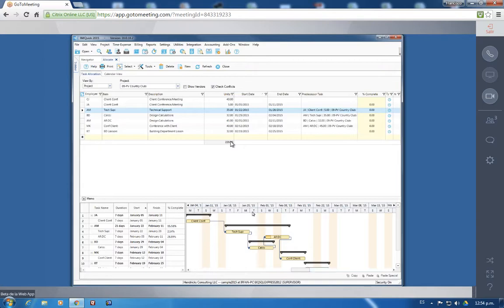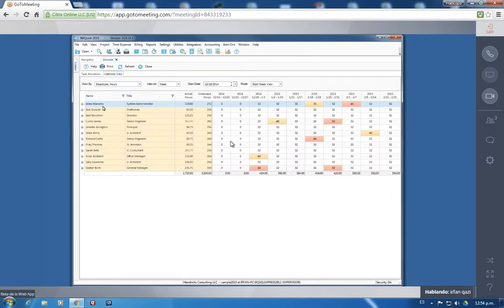Now, once you have done the project allocation on each and every project, employees are getting assigned on the project. You know the number of hours they will be doing and the number of days it will take them to complete it. You will be able to see the calendar of your employees. You can see it by week or by month. It's up to you. And you can see it for the next 10 weeks or 10 months, what your schedule for your employees looks like.